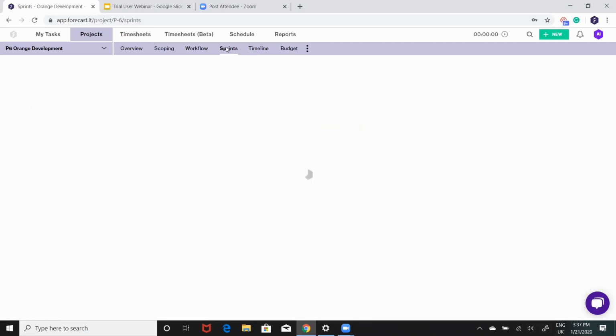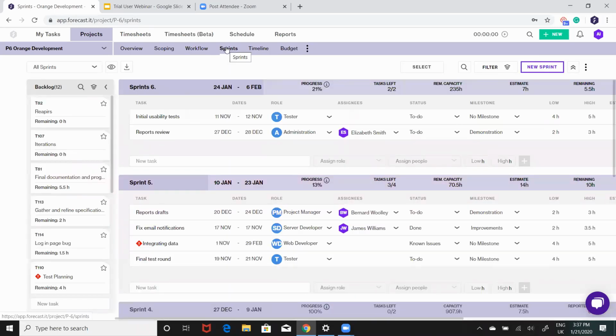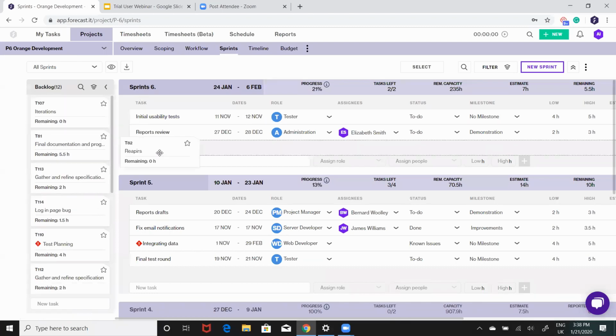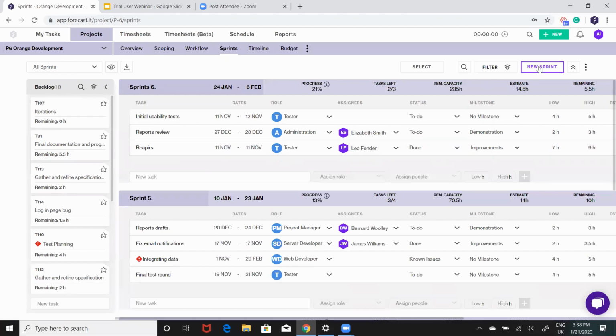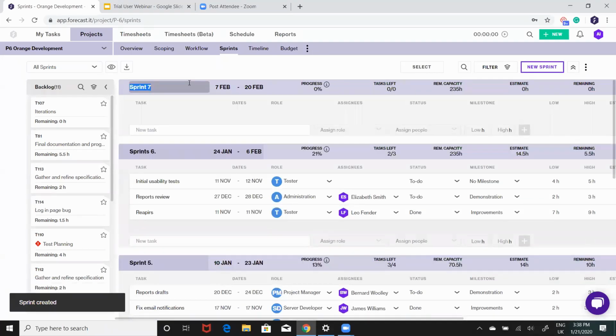Importantly, since Bernard works for an IT company, the most popular mode of work is Agile. And with the new website development project for Orange in full swing, the developers request that Bernard plans and populates well-defined sprints with a clear selection of tasks. With the backlog in place, seen here, it is easy to populate the different sprints, almost as easy as it is to create a new one, with the dates set in automatically according to individual settings.